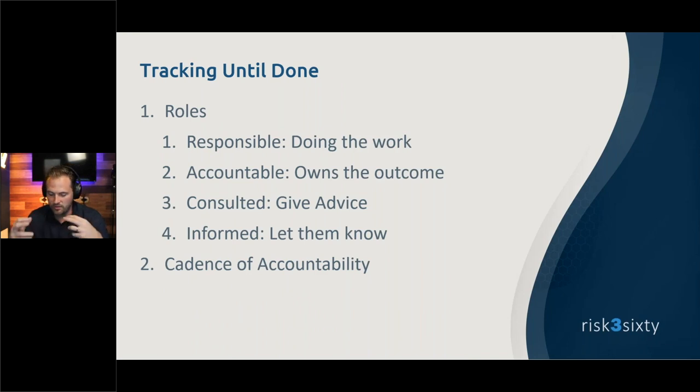And then comes the hard work of actually project managing all of these gaps until they're done. Again, I referenced that video I showed you earlier, where we talk in depth about the project management aspect and working through gaps. But one of the most important things you can do in terms of tracking is knowing who's responsible, accountable, consulted, and informed for each gap.